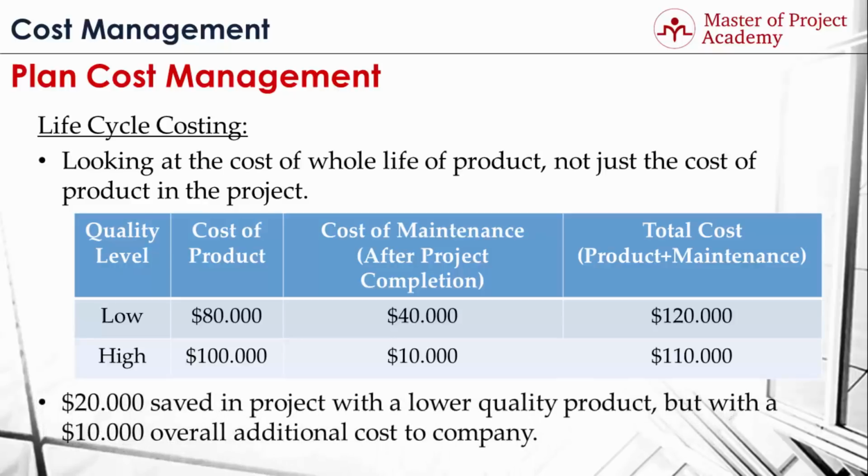Now, if you consider only project costs, buying low-quality pressing machine is more feasible. But your company plans to use it in future projects. Therefore, lifecycle costs must be considered and high-quality pressing machine must be purchased.